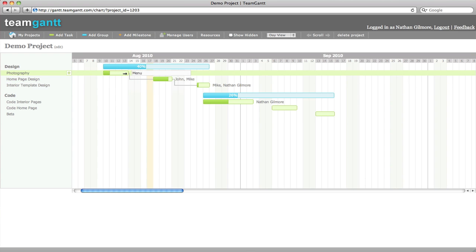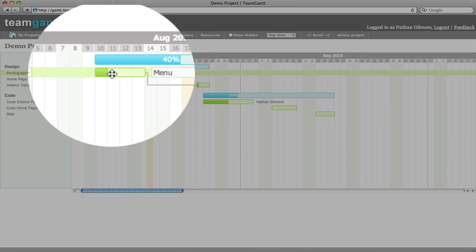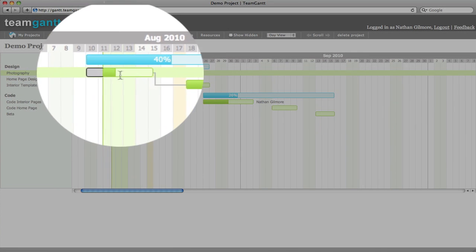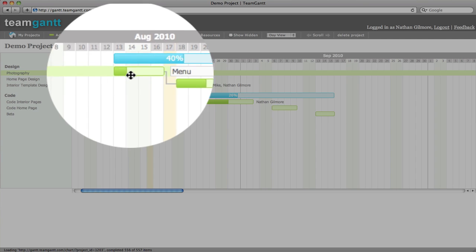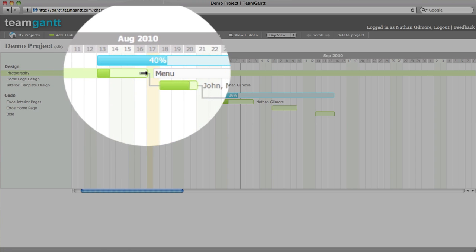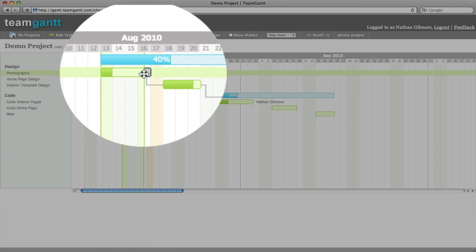You can easily reschedule your tasks by simply dragging and dropping them. You can also resize your tasks.